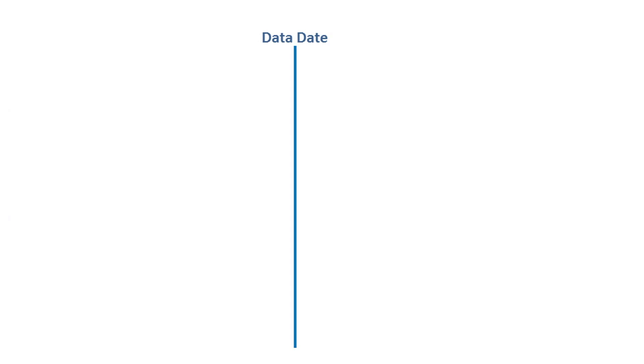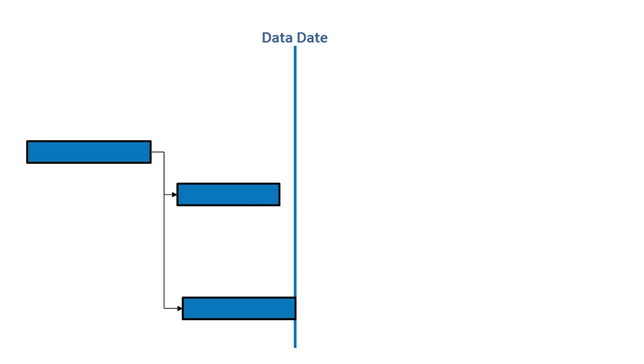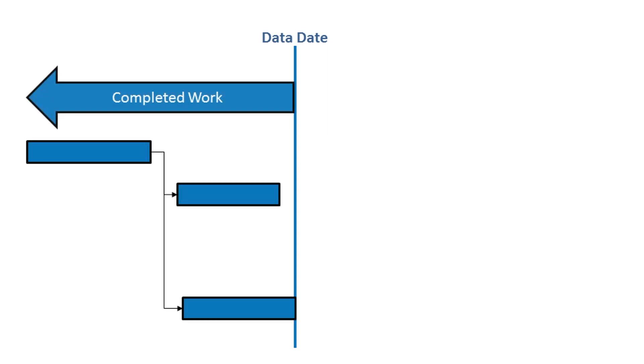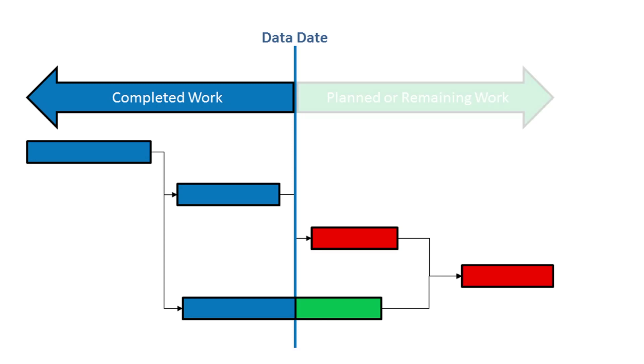The data date in Primavera P6 is the effective status date. Only completed work can exist before the data date, and only planned or remaining work can exist after the data date.